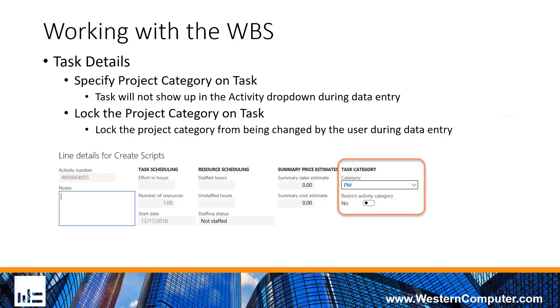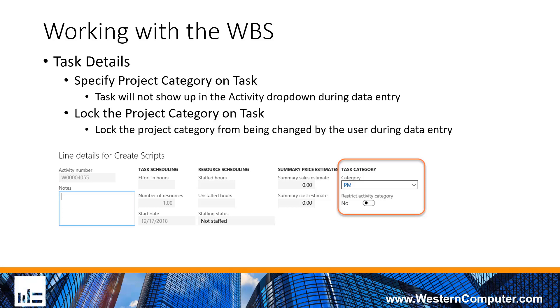Within that work breakdown structure, I've created the tasks. There are certain settings that you can set that allow you to interact with these tasks in a couple of different ways. First, every leaf-level task will have a project category associated to it. That's a fundamental of the project management accounting module. Every transaction must have a project category. So what the system allows you to do is specify a default project category associated to each task.